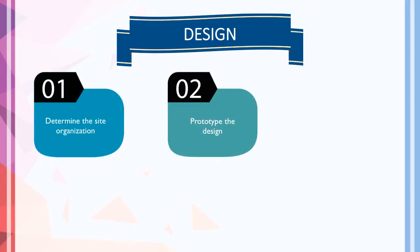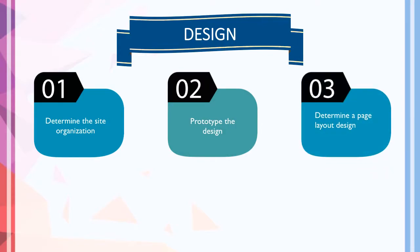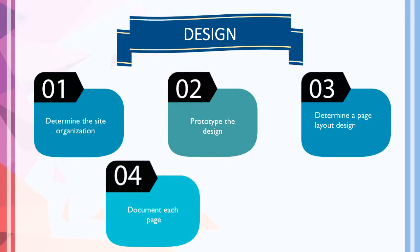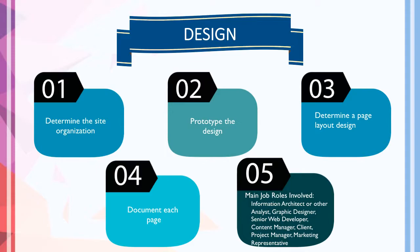Many parties are involved in the design stage. This stage is to determine site organization, prototype the design of the website, determine a page layout, and document each page. The main job roles involved are information architect, other analysts, graphic designer, senior web developer, content manager, client, project manager, and marketing representative.